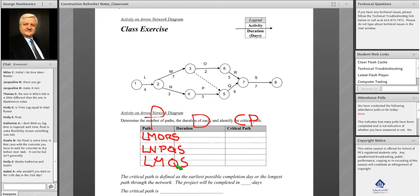That's our first thing. We list all the paths and there's three. Next, what we're going to do is count the duration of each of the paths. Four plus seven plus two plus three plus seven is equal to 23 days.